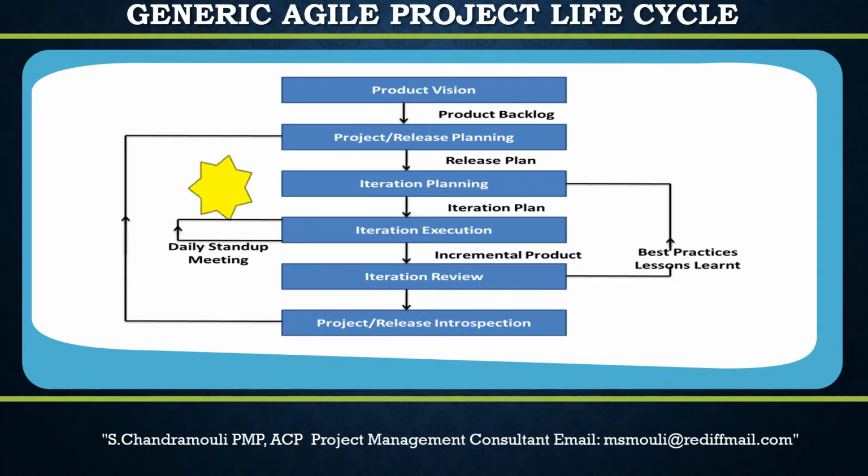Product visioning documents the vision of the product owner, a representative of the customer, which documents what to be changed or created, and the overall efforts involved in creating the product, the target customers, key differentiator from the competitors. Rolling wave planning and progressive elaboration are the techniques used in creating this plan.